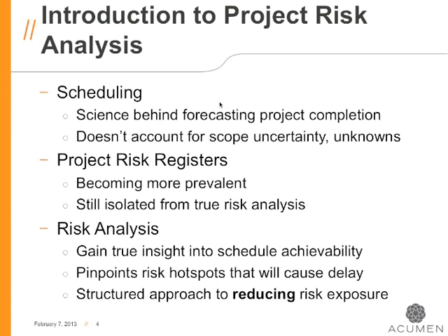Well, to forecast or predict a project completion date, whether it's a year from now or 10 years from now, and predict completion on an exact date, it's ridiculously unrealistic. Statistically, you're going to fail. Instead, isn't it better to take into account uncertainty, risk events, those known unknowns, potentially the unknown unknowns, feed those into what we do know with regards to cost and schedule, and from that, develop things like confidence levels and potentially ranges within which we know we're going to fall, and then as the project moves into execution, try and home in and reduce those ranges back down to a single deterministic value.